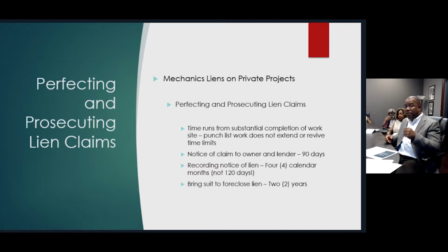In this instance, I wanted to point out, though, just so that you're dangerous in this process, that in order to determine who the owner is, your attorney or someone on your staff should be doing some legwork to determine who legally is the owner of a particular piece of property. That would mean you would probably have to run through assessor records, any kind of tax-related records. You may even have to look at banking information as it relates to the lender. I say that because in some instances, a lender may sell or assign its duties to another bank, or the bank may be purchased by someone else. You have a duty to determine who in that chain of custody has some association with that property.